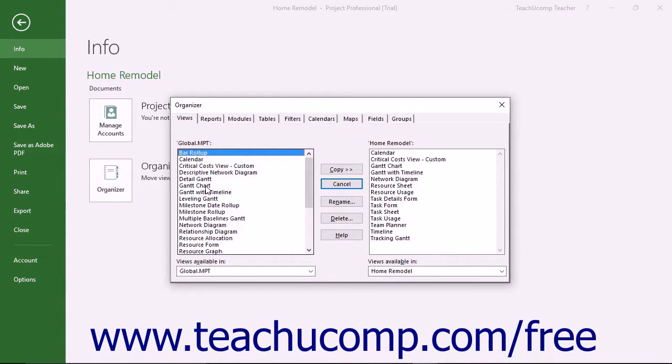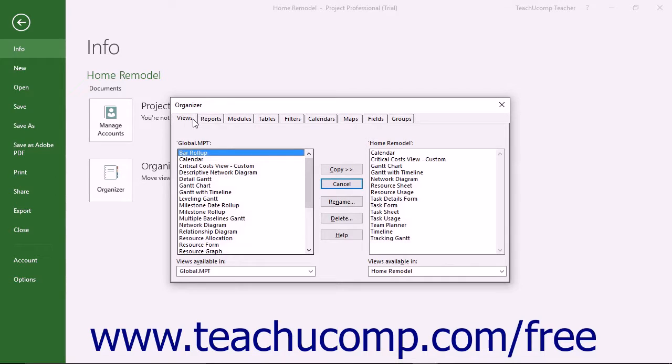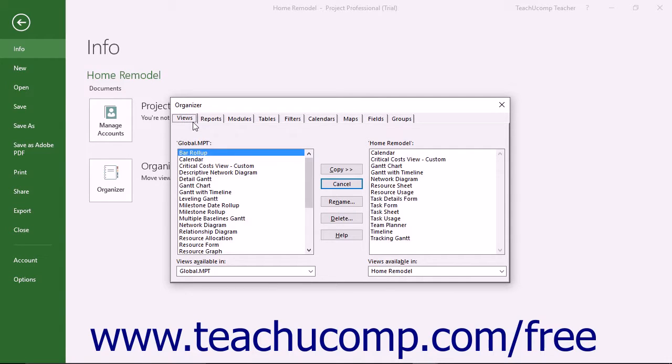The Organizer dialog box shows the various objects you can import and export within the tabs in the dialog box grouped by object category. Click the name of the tab that contains the object you want to transfer from one project file to another.